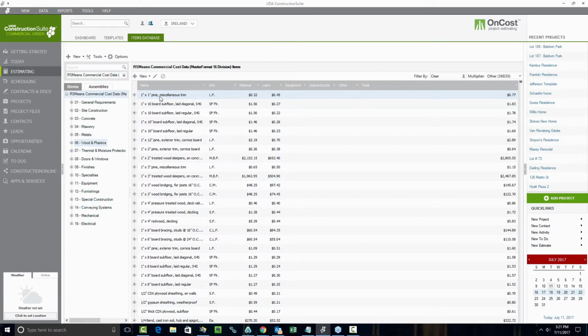And we provide their pricing information, which is based on national averages, and the multiplier just kind of helps you focus in on your area. So if you don't know how much something should cost, by all means, check the cost books. They'll provide some pricing information or a baseline for you. We've also had a lot of clients use this as a point of reference to see if subcontractor quotes are close. Because again, you can check your prices by linear feet or square feet or however you're measuring these things out.